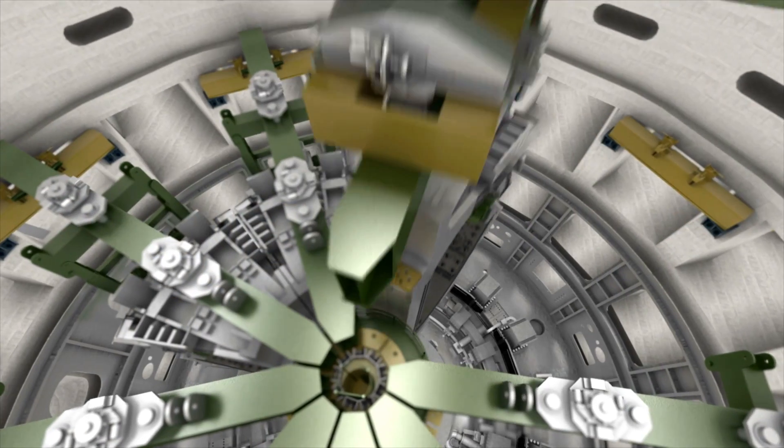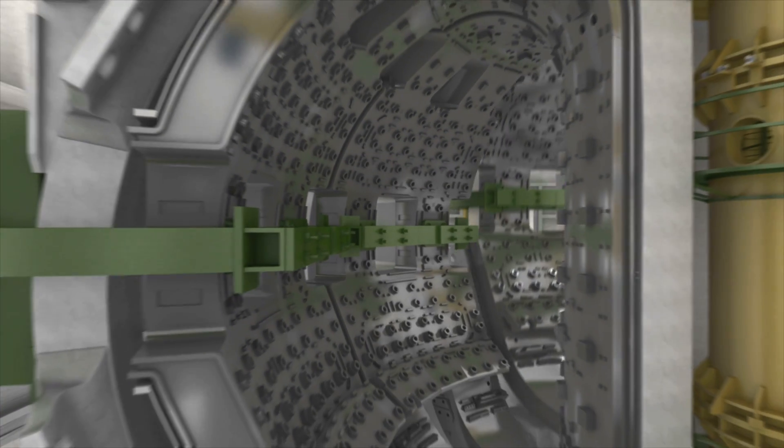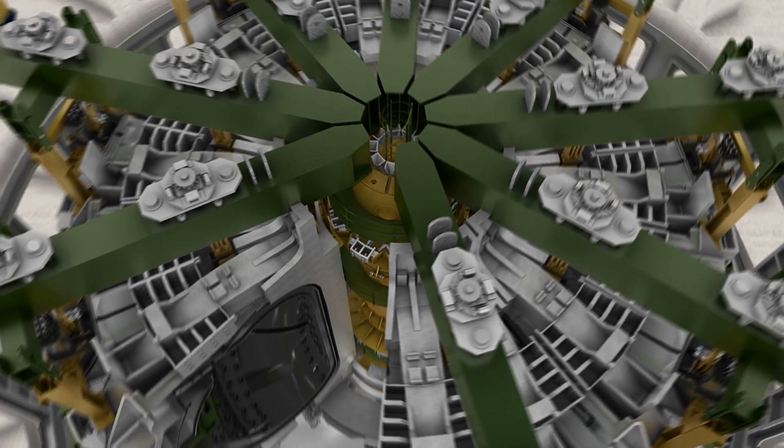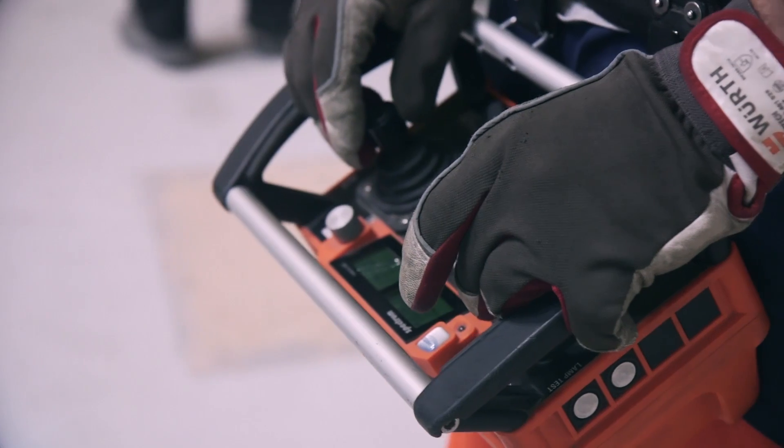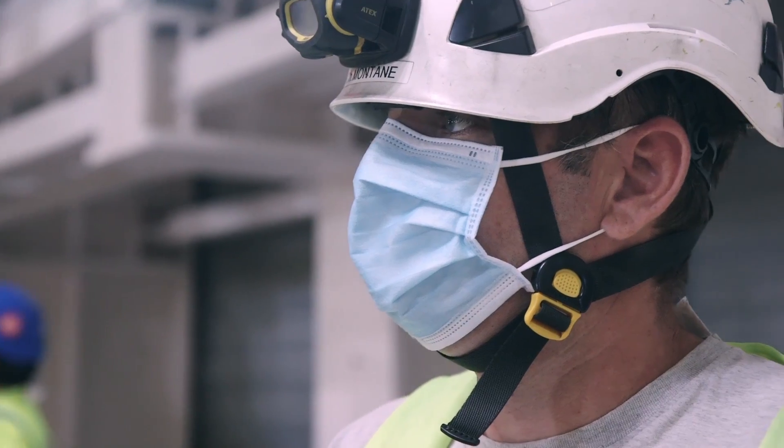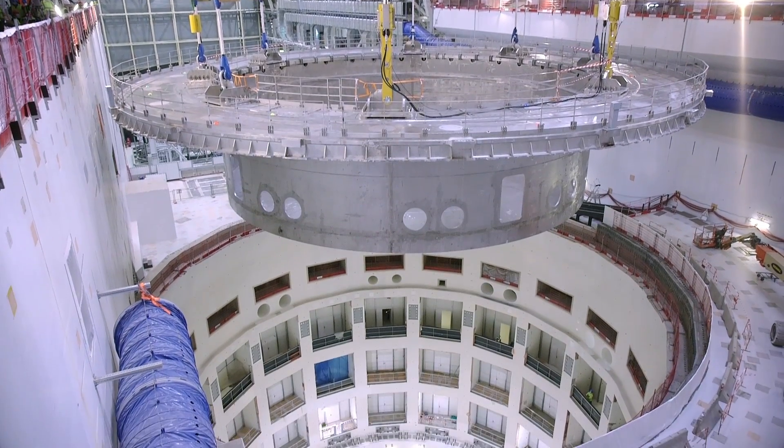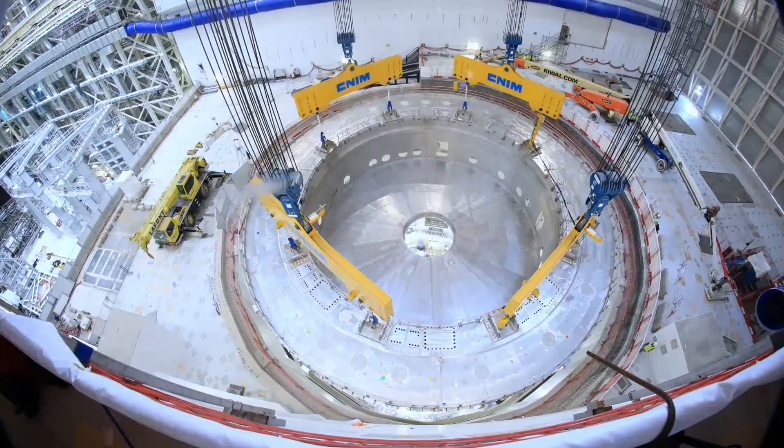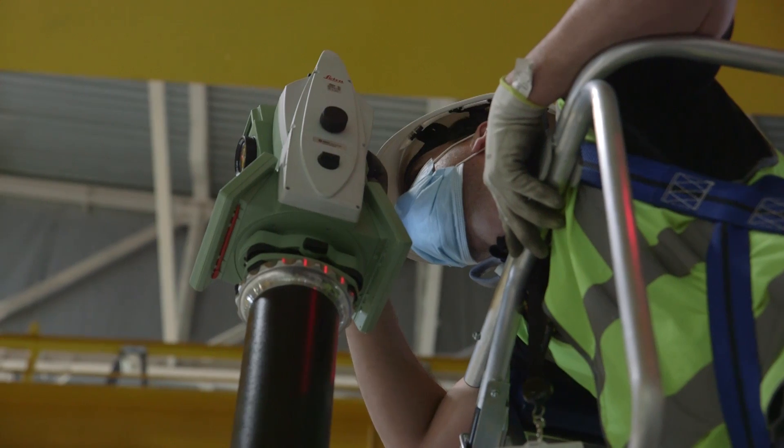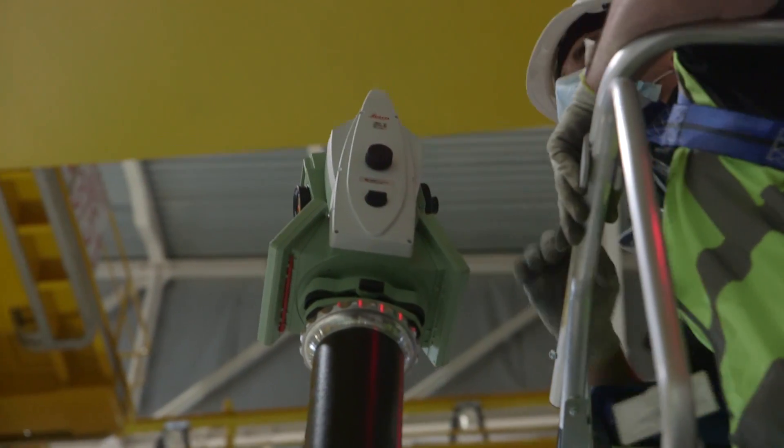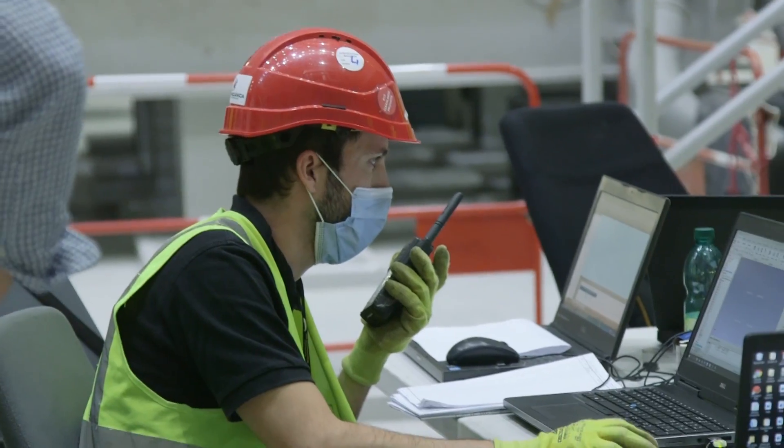There, the input assembly tool will support, align and stabilise the vacuum vessel sub-assemblies as they are joined and welded. This colossus can support a nominal weight of 5,400 tonnes. The precise alignment of ITER's largest and heaviest components to within tolerances of 2-3 millimetres is essential to the successful operation of the machine. Assembly sequences have been planned with this in mind and will utilise sophisticated optical metrology techniques at each step of the assembly process.